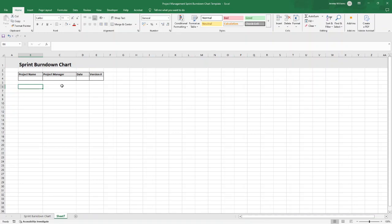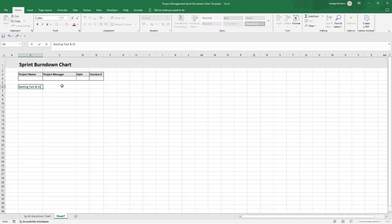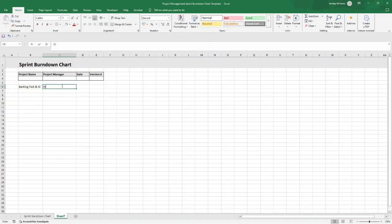Now then it comes on to building out the main table. I'm going to show you all of the different columns I'd recommend and data points you're going to want to capture. Firstly, we're going to have Backlog Task and ID. Essentially, we want to be able to list the user stories and their associated tasks for the sprint under this column.